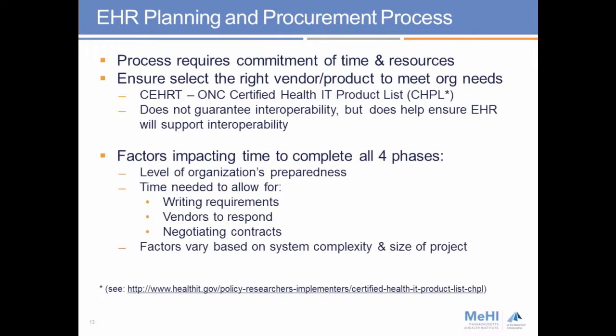Before moving forward, be sure to plan on spending the time to complete all 4 phases. Factors that may impact the time required include the level of your organization's preparation, time needed to write requirements, and the time needed by vendors to compose a response, as well as the time needed to negotiate contracts. These factors will vary based on the complexity of the software system needed and the size of the project.